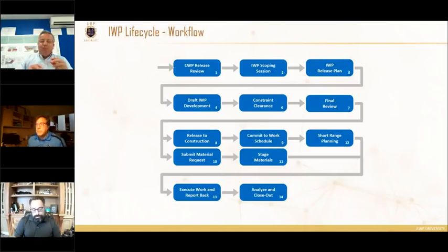Yep. All right, so in follow-on, it's almost like we planned this, Nigel. We're going to talk about the same kind of things here, the benefit, the basis. But the truth is, when I just talked about path of construction planning and the typical scoping tools through IAP sessions for AWP through to the project, when we start talking about field execution and involving the craft, that's a massive aspect of AWP. AWP's first phasing, or that path of construction development, is really all about parsing down the project into chunks that can be easily consumed by the field.